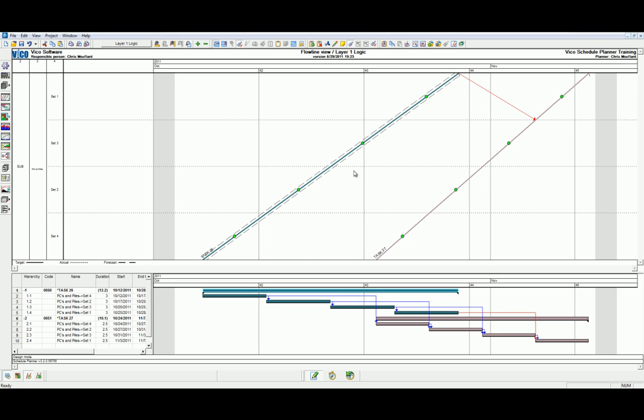The external logic of location-based tasks controls the links between activities or tasks within location, and this forms layer 1 logic. This greatly simplifies the complexity as it is only necessary to create a link between 2 tasks, which is then copied to each individual CPM activity in each location.